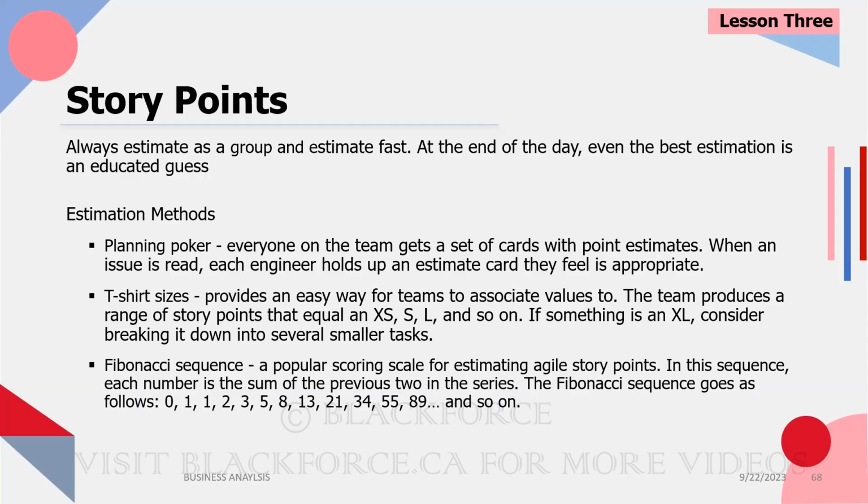Remember that user stories need to be small, straight to the point. And when you start writing a user story and you start using and, or, you probably need to break that user story. A user story should simply be, as this person, I need to be able to do that activity so that I can reap this reward. But when you start saying, I need to be able to do this activity and that activity and, or, if else, no, that user story is too complicated. You need to simplify it. Those are the kind of user stories that everybody's going to raise extra large.